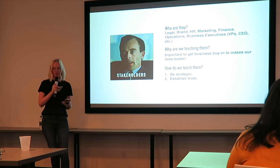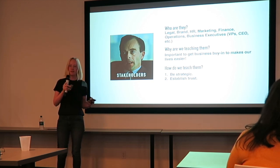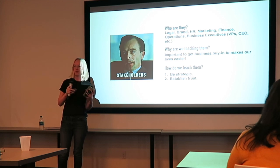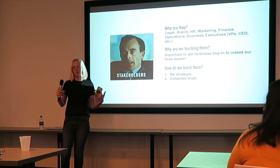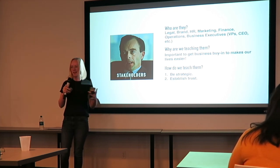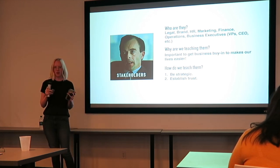And that leads into establishing trust, right? Establish trust. Conduct stakeholder interviews. It's an important part of our process early on in our project. You need to sit down with your stakeholders one-on-one. That develops that trust initially. Talk to them one-on-one before you talk to them all in a room, so that you don't end up with everyone yelling at you and having all these different opinions before they even trust your perspective.